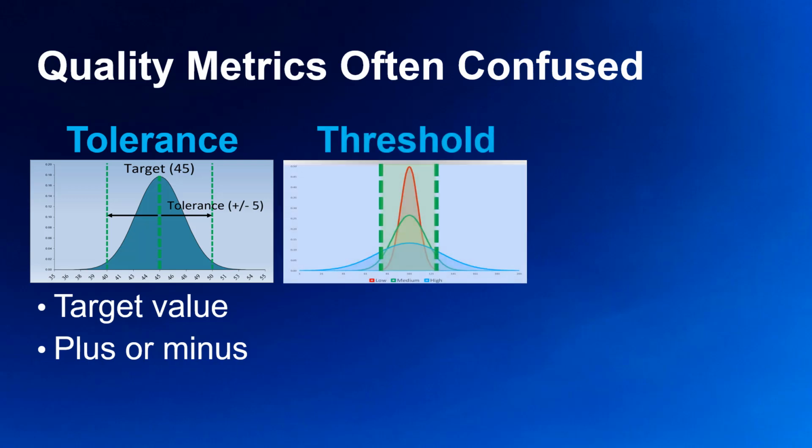Second, threshold. A threshold is a predetermined value of a measurable project variable that represents a limit, usually expressed as a percentage deviation from the target. Once our work performance measures reach that limit, we must take action. So we analyze work performance data compared to the variance thresholds in our project management plan component for risk and cost, such as an allowable cost overrun percentage. We analyze deliverable quality with similar thresholds in dimensions such as square meters.